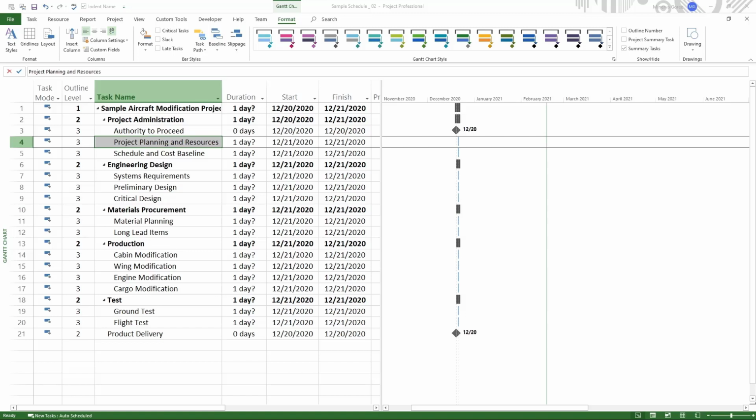Estimation of task duration involves estimating the time each task activity will take to complete. It's important to give the task duration a lot of thought because there may be consequences to the project if the duration is chosen arbitrarily. If you underestimate your task duration, it may cause the project to be behind schedule constantly during project execution. This may make your team look bad for not being able to meet task deadlines. If you overestimate task durations, then your project will take longer than necessary and may cost a greater amount than necessary.